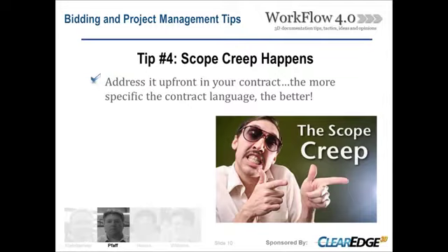Scope creep. I think we're all familiar with how that works. We've been able to circumvent some of these issues when we have our initial site meeting, where we go over in detail what is expected from the client and the MEP folks on their side, and then what we're ultimately going to give them as a result, and bring up the specs and limits to height and size, what we're going to actually model and what we're not.